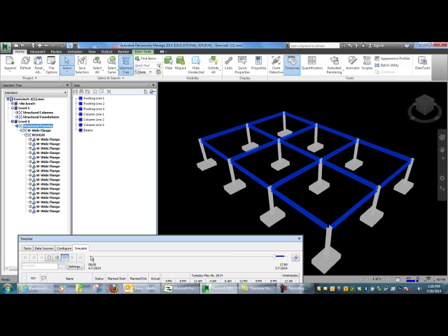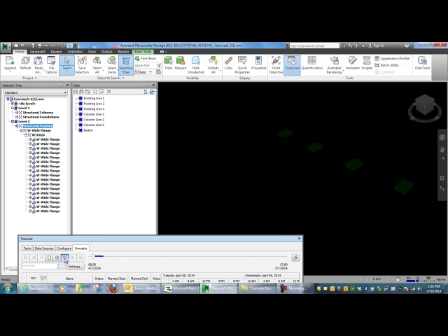And the only thing that you might say is that when you are constructing column lines 2 and 3, it's not like you'd necessarily wait to have the columns on the footings being installed before the second line of footings.